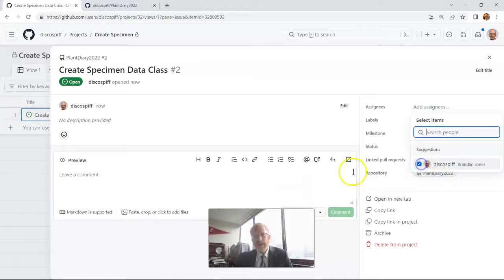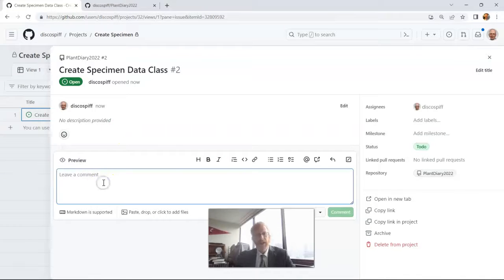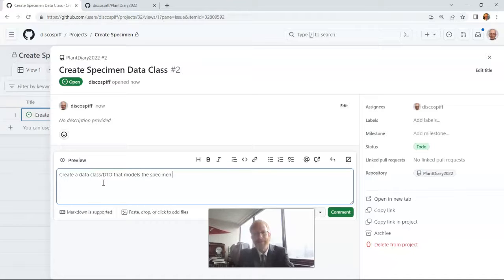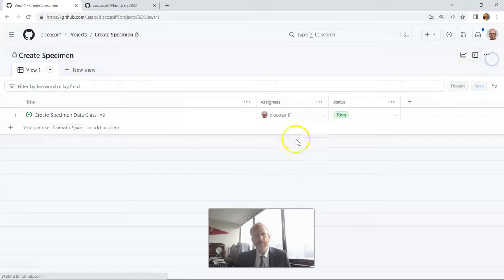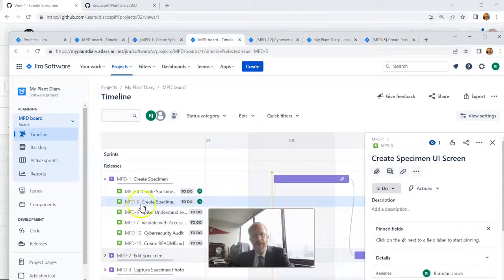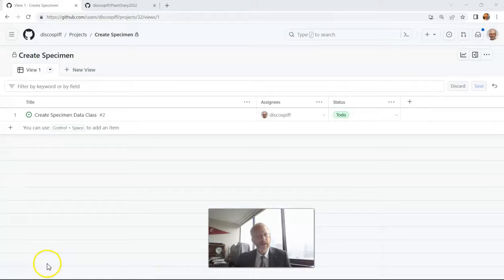I can assign it to me. At this point, because we've gone from epic level down to our technical tasks, many times what we'll do is meet with our tech leads and work out the details of the ticket and put those details in here — for example, 'create a data class DTO that models this specimen.' We can add a comment, labels, milestones — these are all things that are going to be very handy. Effectively, we do this for each of those technical tasks that will elaborate our story.